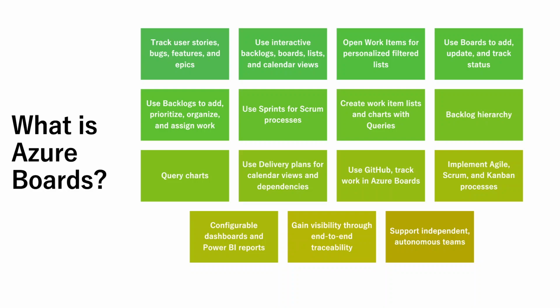Generally, a team refers to a group of project members who work in a particular product area. Those areas are represented as area paths. Area paths are hierarchical paths that denote the possible areas of ownership in an organization. Generally, a team is defined by a name, its members, and its area path. Boards, backlogs, sprints, and delivery plans rely on the team's configuration. For example, if you want to add a Kanban board, a Scrum board, or a product backlog, you define a team and use that information there.